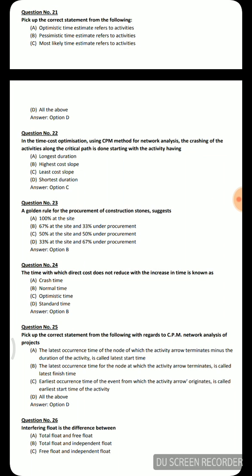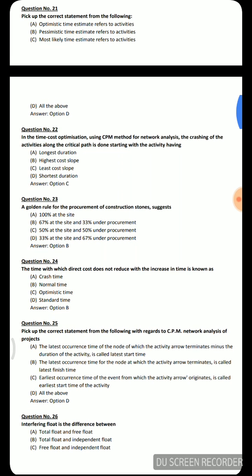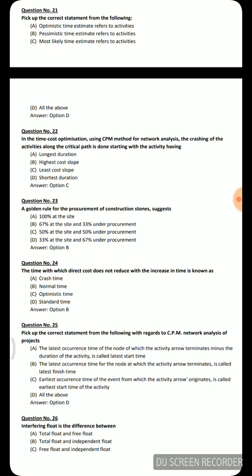First question: pick up the correct statement from the following. Option A: optimistic time estimate refers to activities. Option B: pessimistic time estimate refers to activities. Option C: most likely time estimate refers to activities. Option D: all of the above. Time estimation is for activities — events do not have time — so option D is the correct answer.